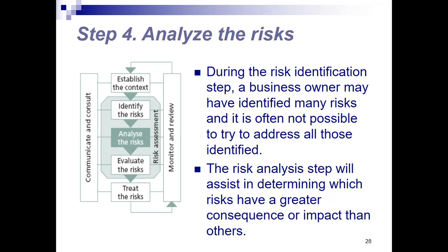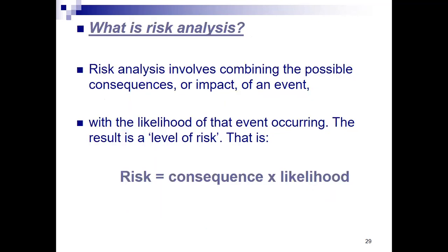The risk analysis step will assist in determining which risks have a greater consequence or impact than the others. And the greater the consequence of the risks, I'm pretty sure that the more actions will be devoted, or more analysis could be devoted. Now, risk analysis involves combining the possible consequences or impact of an event with the likelihood of that event occurring, the result is a level of risks.